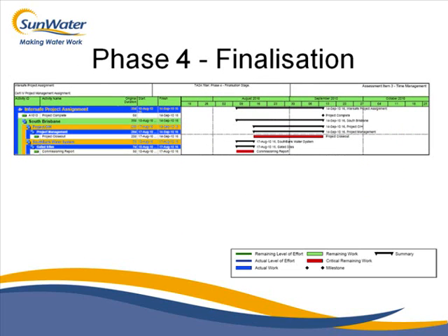And then finalisation. Once it's all been installed, we'll do a commissioning of the sites, making sure they all run. They'll do a week-long activity of doing a report, making sure that they all are done, and then we'll go into the closeout of the project, closing down, making sure the financials are done, all the documentation's done, lessons learnt, and any other registers that we have to update.